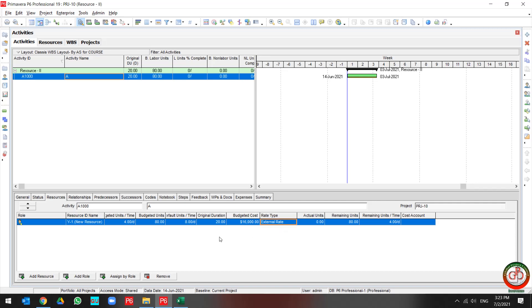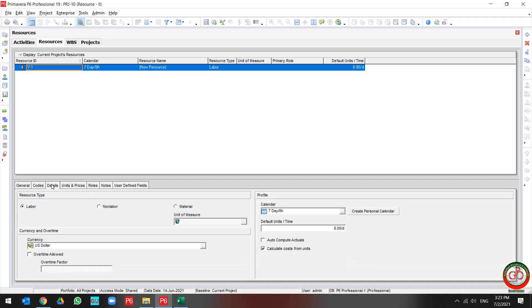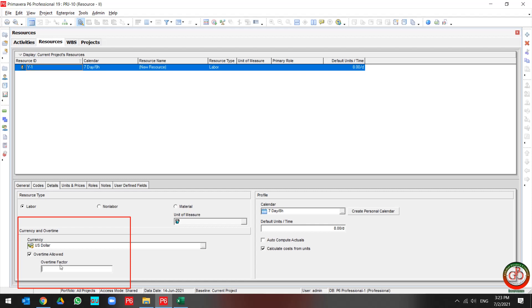The other thing is maybe you need to use extra working hours for this resource during the project. You should come back to the resource, go to default, and assign overtime allowed and assign the overtime factor.